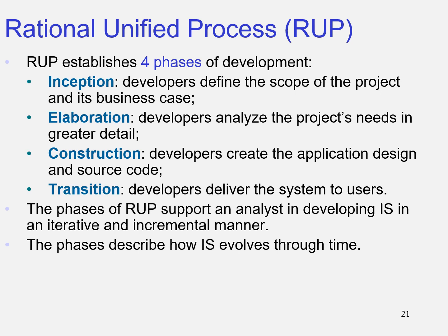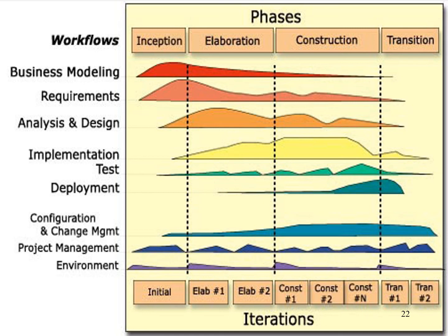So still following the same phases, but with slightly different names. Okay, how does it look? It looks like this, right? The phases that I mentioned just now are here: inception, elaboration, construction, transition. And on this side in RUP, it has an additional element called workflow. Business modeling, requirement, analysis and design, implementation, test, deployment, and then configuration management, project management, and environment.